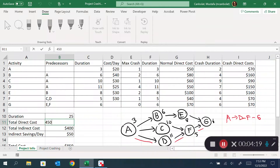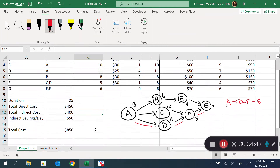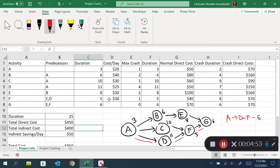Indirect costs, on the other hand, are overhead costs and other expenses that occur every day no matter what. Right now there are 400 dollars in indirect costs, but if you reduce the project duration from 25 to 24 days you save 50 dollars. However, you also incur additional direct costs by shortening the duration, so this becomes a decision-making process.